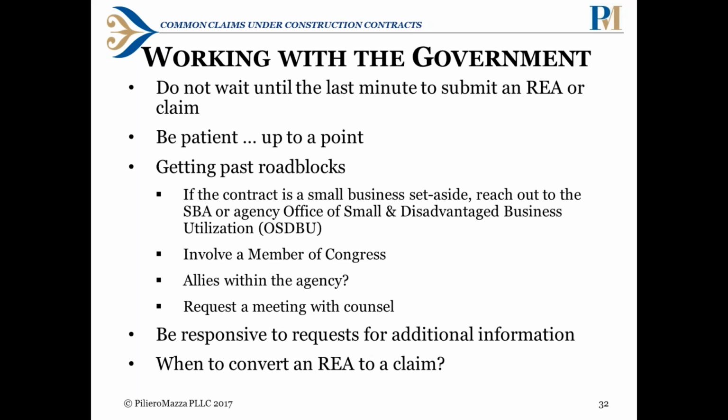Working with the government. One of the questions we got is that this contractor has had several REAs sitting with the Navy for approaching a year. I've been in those shoes working with clients. That's often a point where you want to just convert it into a claim, because the government is not required to respond to an REA. But if you have a good relationship with the government, it's good to start with the REA.